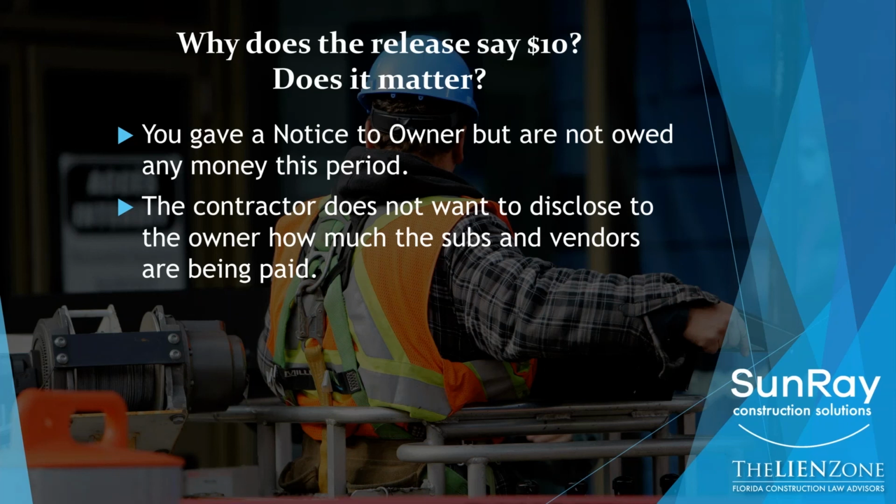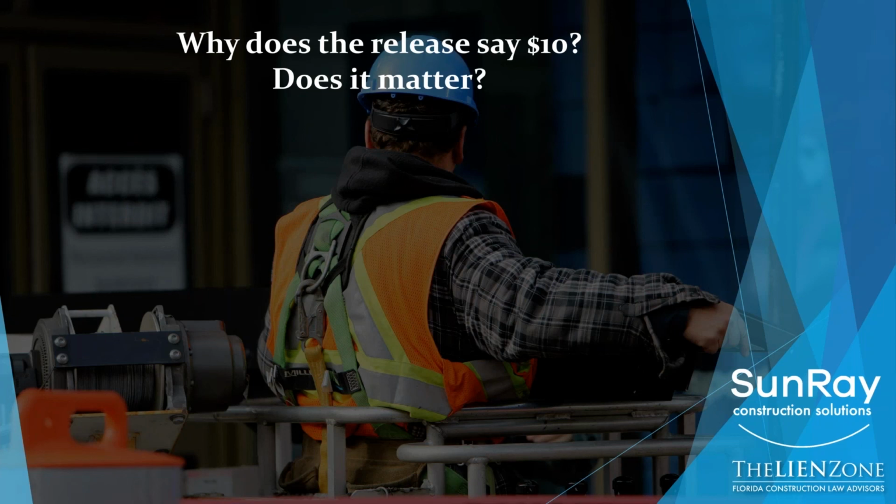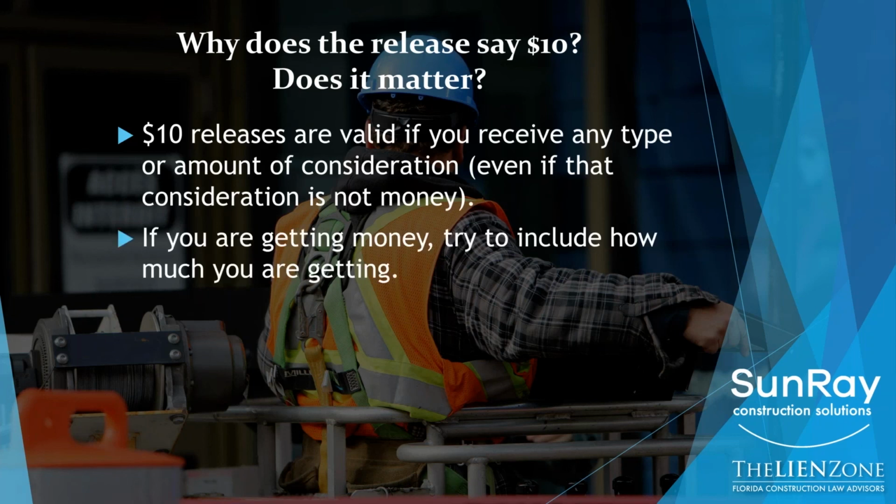When that is the case, what you as the sub should do is say, okay, I'm expecting a $50,000 check. I will give you a release and it should say $50,000 on it. Once that check clears, then I'll give you a release that says $10 and you can hand that to the owner. But the general rule is, the $10 releases are valid if you receive any amount of money, no matter what.